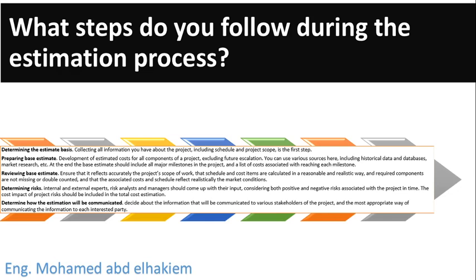Third, reviewing the base estimate: ensuring it accurately reflects the project's scope of work, that schedule and cost items are calculated in a reasonable and realistic way, required components are not missing or double-counted, and that associated costs and schedule realistically reflect market conditions. Fourth, determining risks: internal and external experts, risk analysts, and managers should provide input, considering both positive and negative risks. The cost impact of project risk should be included in the total cost estimation. Fifth, determine how the estimation will be communicated to various stakeholders and the most appropriate way of communicating the information to each interested party.